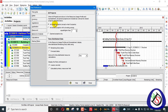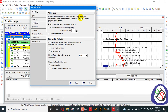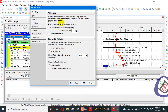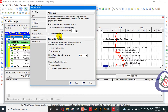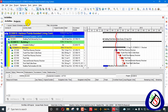When all projects are shown in the resource usage profile and spreadsheet, all open projects are included as well as closed projects as specified below. By default on your system, it is set to open projects only. When we close this dialog and go to the resource usage profile view, you can see it there.